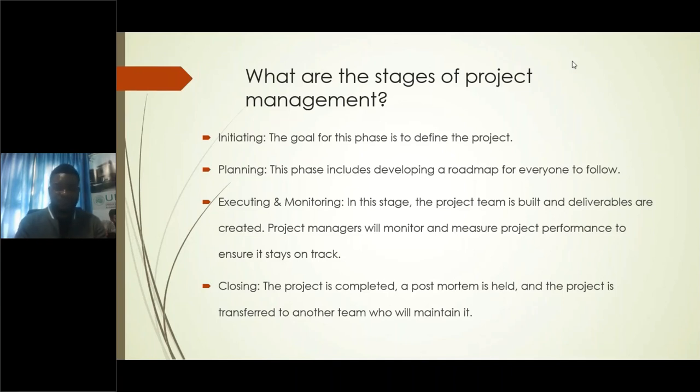That's the planning phase. So there are several stakeholders involved in the planning phase: you have the project sponsor, the project manager, and the project team members. But in the initiation, it's only the sponsor and his team that is involved. Once there's an agreement on the budget, the scope, the time, and everything, the sponsor will prepare a project charter, which will be signed by both the sponsor, the owner of the project, and the project manager.